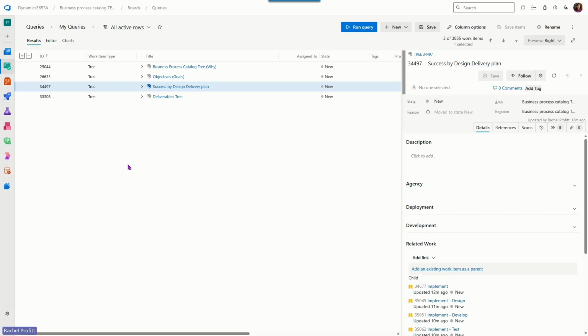And so after you've done that storyline design review workshop, you would need to document your gaps and your RAID log. So any risks, actions, issues, and decisions. We also, at that point, you're ready to refine your acquire to dispose user stories, plan those detailed design workshops, and you can start and create your acquire to dispose design document.